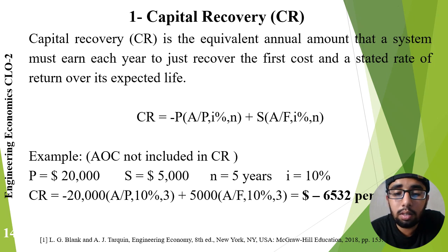The formula shown in the slide includes the initial cost, salvage value, interest rate, and project life. Capital recovery is commonly used when comparing equipment alternatives. For example, if two machines have different purchase prices and useful lives, capital recovery converts both to annual values for easier comparison. This makes decision making more objective and practical.